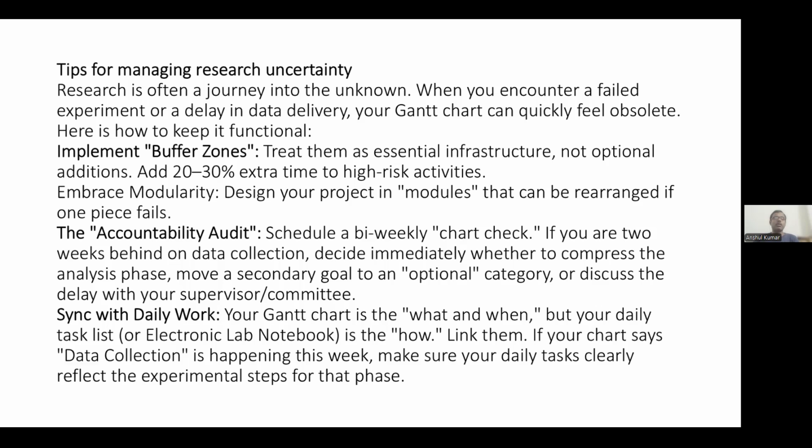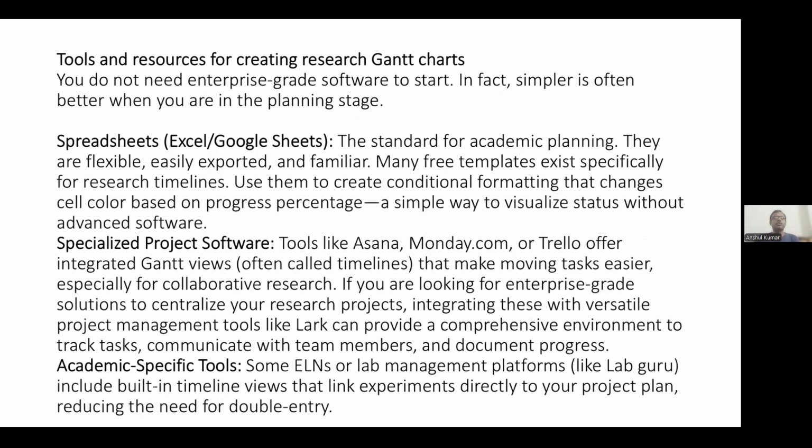Sync with daily work. The Gantt chart is the what and when, but our daily task list is the how. Link them. If our chart shows data collection is happening this week, make sure the daily tasks clearly reflect the experimental steps for that phase. Next, the tools and resources for creating research Gantt charts.